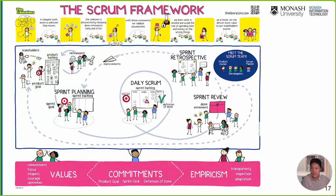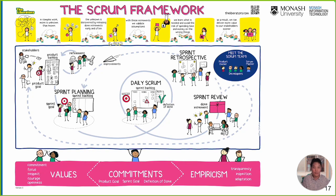What is Scrum? In complex work, more is unknown than known. For example, when you start developing an app without analyzing the requirements, you never think about things like multi-factor authentication, whether to use email as a username, how to decide the class, or what data attributes to store — there are so many unknowns. The unknown is discovered by releasing done increments early and often. For assessment one, you already analyzed the requirements, so you started to think about the unknown things. Another unknown is acceptance criteria — when you haven't developed the application, you have no idea how to test it or ensure the end user is satisfied. We validate assumptions with each increment, learn what is needed, and avoid spending time and money on the wrong things.